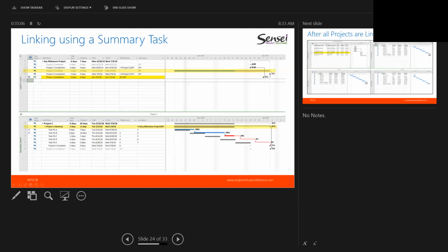So this allows you to see the overall progress of the project, and also to see any lateness that you're then going to talk to this project 2 owner about, to see what we're going to do. Can we recover to bring this back to where we need to be, which is 7.1, okay? You know, we don't need to finish at the original baseline date, but we need to finish somewhere around 7.1. So we're 3 days behind in the schedule, and the discussion then goes to project manager 2. What are you going to do to fix it?